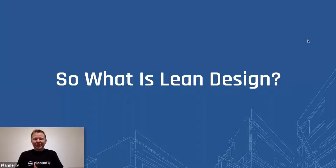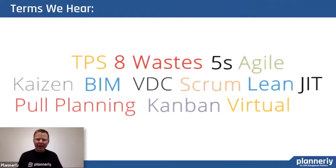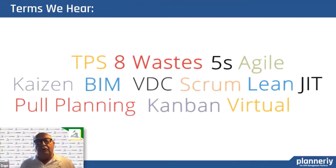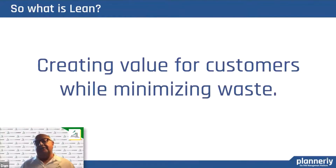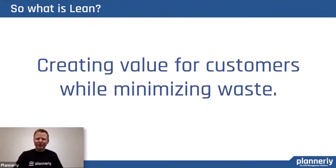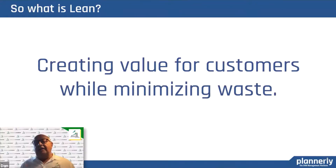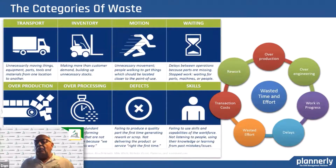So what is lean design? When we talk about design and apply lean, we hear lots of terms: Kaizen means improvement, BIM you know all about, virtual design and construction, and so on. Lean in design does not mean less design — that's the important distinction. It's creating value for customers while minimizing waste for the design team. Rather than redesign, redesign, redesign based on changes, it's a way to design with less waste — understanding what the customer needs and really delivering that, and releasing work in a way that enables more work, designing as information is needed.